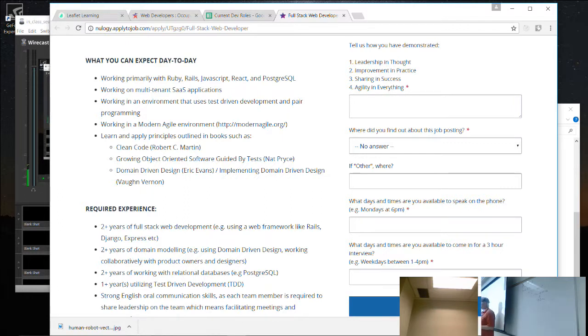So to sum it up really quickly, a user story always has 3 parts to it. You identify who you're building this feature for, what they would do, and why they would do it. It's that simple. User stories are very, very basic, but they're very important, right? Because think of that first one. You need to know who is the person that you're doing this for.